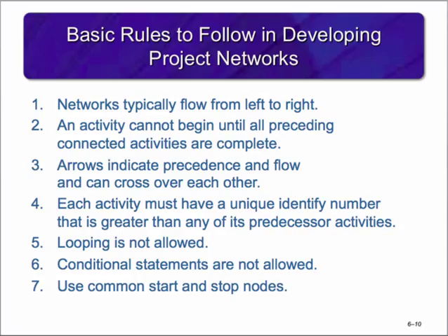Here are some basic rules to follow when developing a project network. 1. Networks typically flow from left to right. 2. An activity cannot begin until all preceding connected activities are complete. 3.